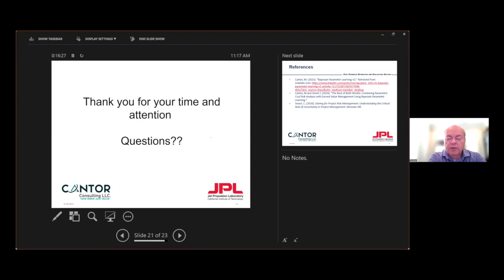Yes, Chris, I'm sorry. Oh, it's okay. So Kelly, I'll give you a concrete example of how I envision applying it at JPL. We do parametric cost estimates up through critical design review. After that point, say at system integration review, we don't do a parametric cost estimate. Instead, we look at earned value data and try to use that to forecast. What's been done in the past is looking at heuristics, for example, taking 1 over CPI or 1 over CPI times SPI, and looking at cost growth factors. So it's a little bit ad hoc.